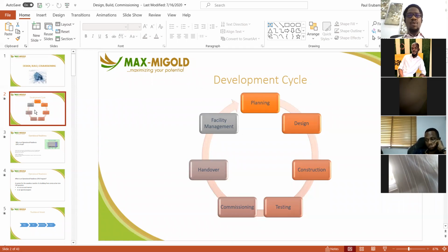And with the design drawings and the bills of quantities, you now put them together to create a contract document. I hope I'm being explicit enough about this outline for everybody, so you follow the entire process. You create a contract document. The contract document is a contract between the owner and the would-be construction company, and it incorporates both the design drawings and the bills of quantities. It also incorporates certain licenses and approvals that will permit the work to progress during construction.